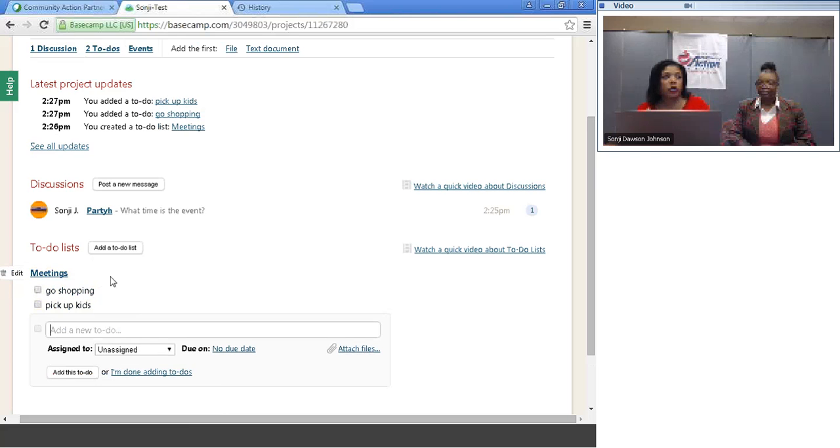So as you're creating your punch list, you can assign those various tasks to different individuals within your group by clicking on the Assign button. You click on the drop-down arrow, and you can assign that particular task to someone and the due date in which that task needs to be completed. So the to-do list obviously will help you stay abreast and know what's going on with this particular project.